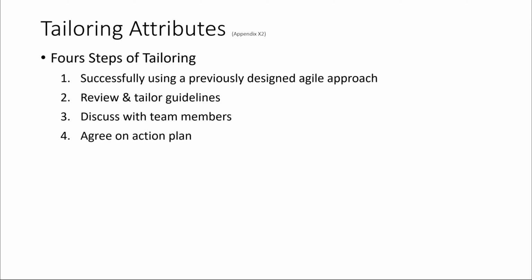Having tried it for a time-boxed period, the team should review its effectiveness at a retrospective to determine whether it should be continued as is, modified to improve it, or dropped from use. Finally, a successfully adopted tailored approach can be institutionalized into the standard processes used for projects that share these characteristics. It is also recommended that guidelines from Section 5 be followed, which describe adopting or tailoring new approaches.